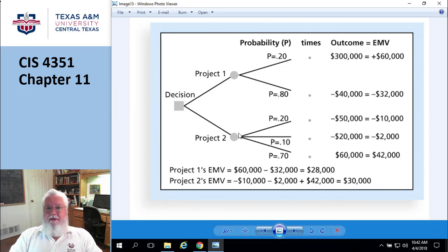So with Monte Carlo analysis, one of the things you could say is, let's say I'm trying to figure out what my end date is for a particular project. I could say, run the analysis and tell me what date is probably going to have like a 50% chance of being met. I'd like to know that. What date would probably be the 75% chance of being met? So 50% chance says, well, it's going to be done on April 2nd. And the 75% chance is May 1st, right? I mean, you could go to absurdity and say 100% chance, and that'd probably be like June or something, but that's not realistic. So you're kind of trying to bracket in your choices.